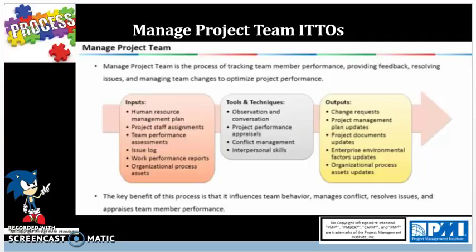And you have 5 types. You have withdraw, where you're trying to retreat from an actual or potential conflict situation, postponing the issue to be better prepared or to be resolved by others. Typically, this is not the way to go because as a project manager, we're trying to be proactive and solve the problems. Next, you have smooth and accommodate.